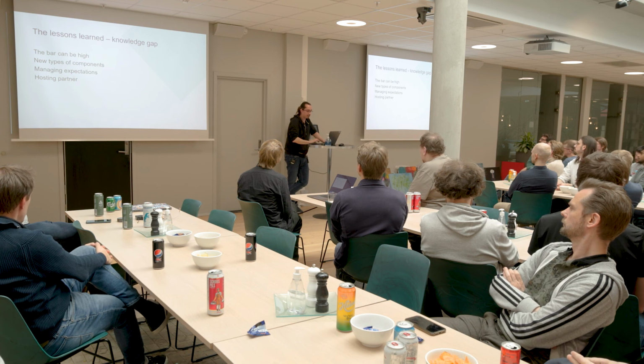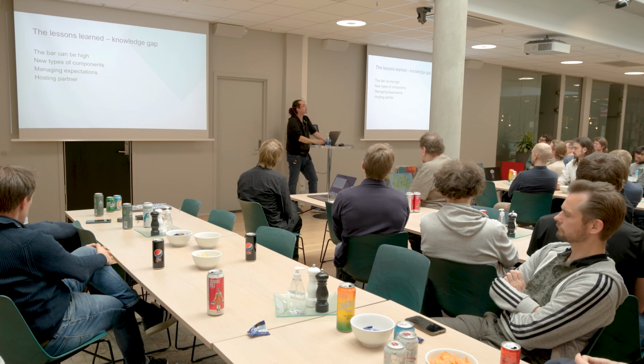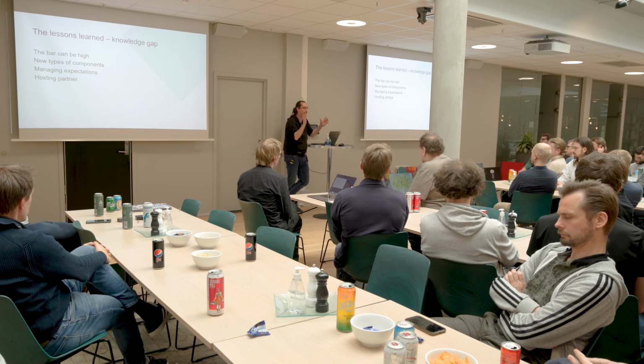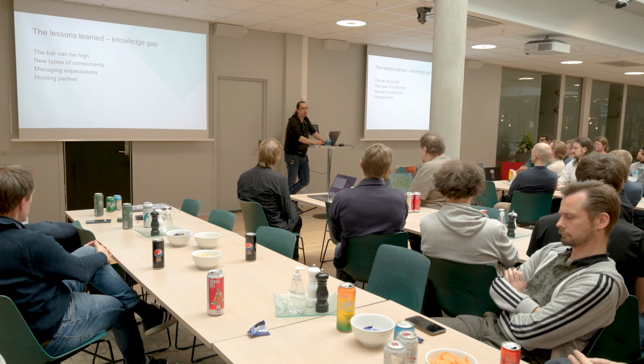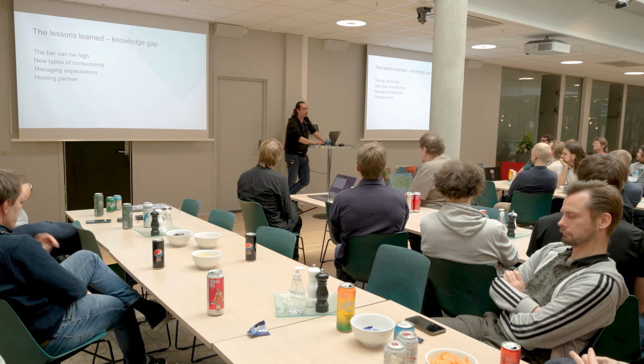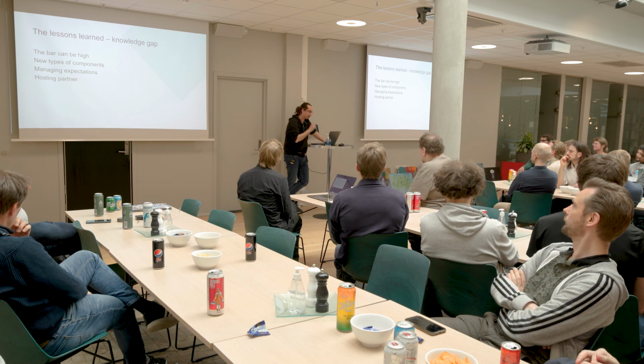Managing expectations is incredibly important, specifically in terms of the rest of the organization and how this affects them. We have a bunch of testers, for instance, that use certain tools that suddenly will not work because they are so tightly knitted together with the older infrastructure. So how do we replace that? How do we replace this tool? How do we replace that feature and this feature and so on? Which is something we missed, basically. And I mean, we did manage to put together a solution right at the end, but we did put ourselves in a bit of an uncomfortable position there.